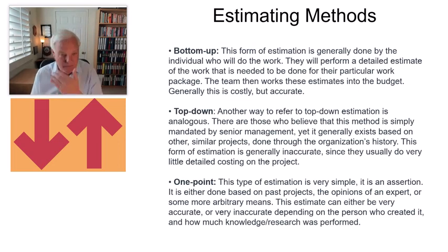It's done based on past projects. The last time we did this, say the last time we tested a mega driver, it cost this. That estimate can then be used and articulated into future work packages. If that estimation was accurate, you're spot on. You should be really, really close.